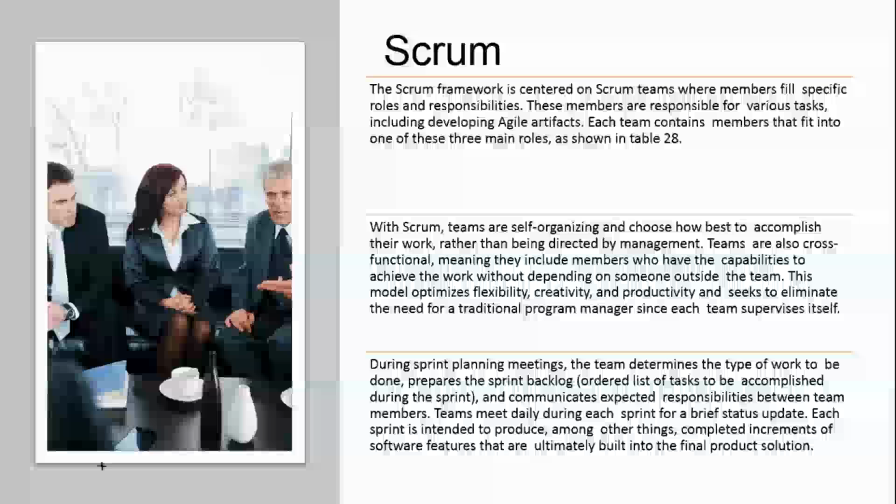We need to be really careful when we use the word status, because when we use the word status, people think about readouts, and readout meetings are, in essence, valueless. Instead, we need to think about the daily Scrum as a planning meeting, as a meeting where we uncover impediments, as a meeting where we move the team forward, not just a status meeting. So I do want to correct that. For those of you more experienced Agilists, you will read this and you'll definitely have your own corrections to make. But it is nonetheless a great start at representing the information.